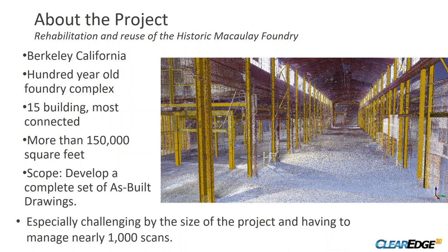What we were looking for out of this was an as-built set of drawings that we could give to the city of Berkeley. And when we first started shopping around, it was amazing what people wanted to produce that set of as-built drawings and how long it was going to take to do that. It turned out that doing it this way saved us a tremendous amount of time and money. We did scans approximately every 40 feet in this large open area, the cathedral space that you can kind of see here. And this included a mixture of steel and timber, and using Edgewise, we were able to extract both of those out and get them as accurately as to what was actually there.